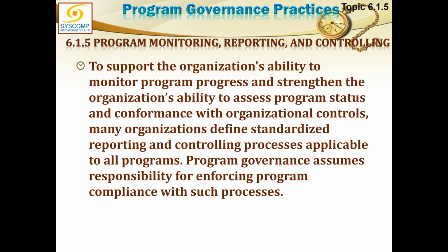We should only send that much information which is affecting a KPI, or any change to the program status which is indicated by KPIs, that much only must be sent up to the governance board. Governance board should not be sent detailed reports about day-to-day working of the whole program. They don't need to know that. That information is useless for them. So they should only get the update on the KPIs. That is called the performance reporting.